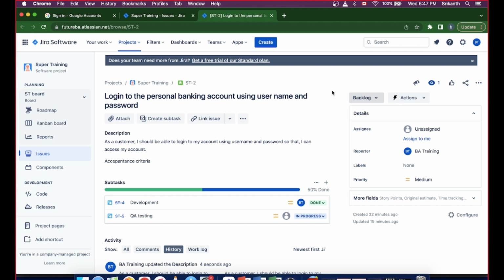You can change your profile settings and details, access your mini statement, do funds transfer, deposit funds, generate a detailed statement, add or remove a beneficiary. So there are tons of actions in personal banking. So "manage my account" cannot be a story because you get tons of actions under that. It should be an epic.